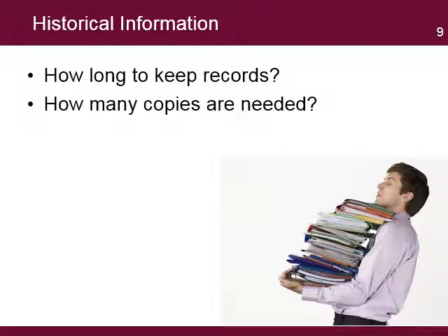Each project must make its own decision about what records have programmatic significance and for how long they are maintained. For example, a project may make multiple copies of some documents to allow for easy access to or wide distribution of information. Generally, the original document should be retained for the required period, but copies can be destroyed at the project's discretion.